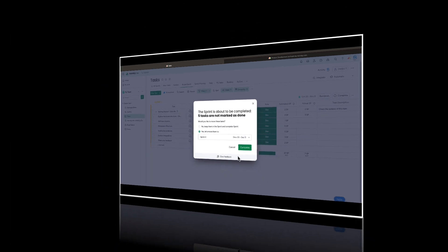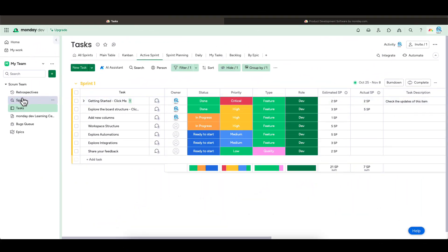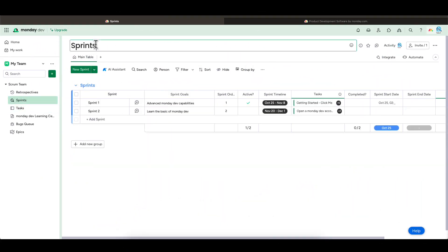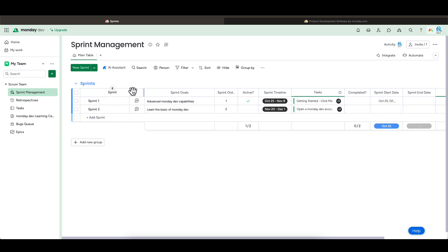I actually call this the sprint management board. Actually, let's rename this to the sprint management board. This board manages your sprints. It allows you to define and capture the sprint goal, set your sprint start and end date.